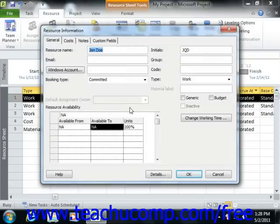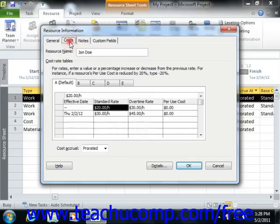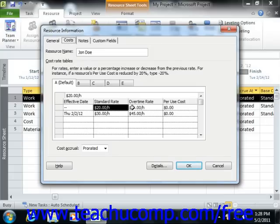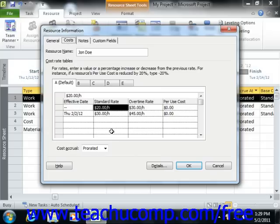Within this dialog box, you can click the Costs tab in order to enter detailed costing information. On the Costs tab, you can set detailed costing information that you cannot set by simply using the cells available in the resource sheet view. Also note that cost data cannot be set when initially creating items within the resource sheet view. It can only be added after you have saved the resource into the resource sheet as an editing task.